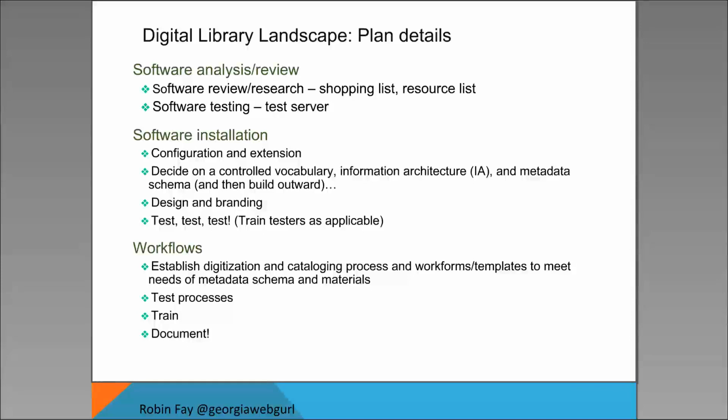Now it depends on your project. So when I worked on one grant project, the 3 parts of the grant mandate were that anything that we created must be open. Well, that meant we couldn't use commercial software, because even though we didn't create it, anything we used in that project had to be open. So, okay, we had to use open source software. Well, there's half of our choice or a third of our choice right there. We have to use open source software. So that has to go on our shopping list. Top of the list must be open source.